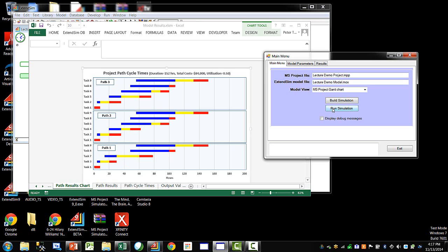That's good, but not as good as the 126 hours we just saw. However, we're down at $84,000. So this is this trade-off of trying to find where the sweet spot is. Is it really worth paying the extra money to have more resources available, or to keep them busy, or to keep them scheduled longer?